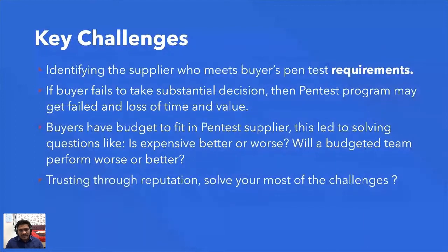A lot of buyers just start floating RFPs before having a home ground, or before having an understanding of what requirements they might have in the company or with the different decisions of the stakeholders. So for that, I think the very key challenge, I would say, is buyers need to understand their requirements first, before they go to the penetration testers. A lot of the time, if the buyer fails with this very important decision, then the very big problem is loss of time as well as loss of value.